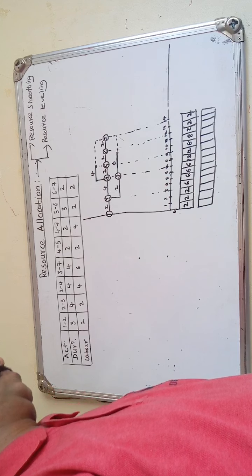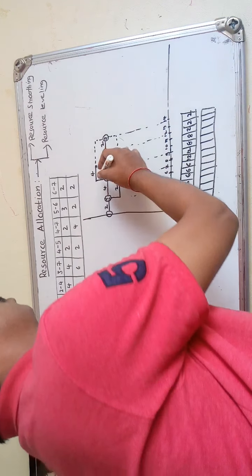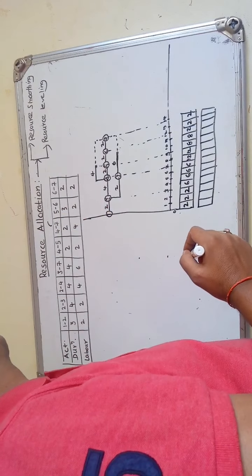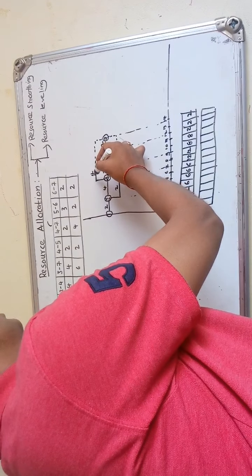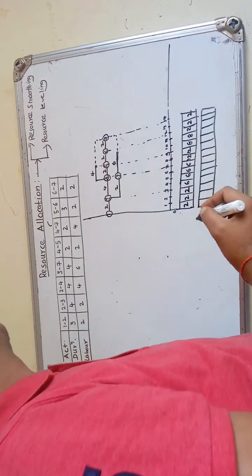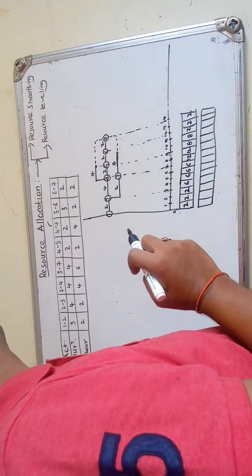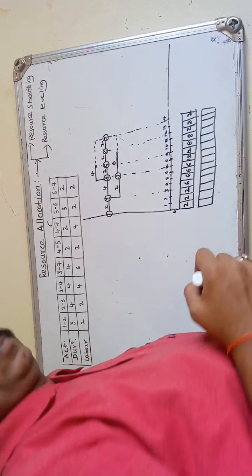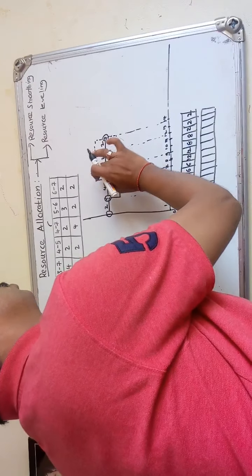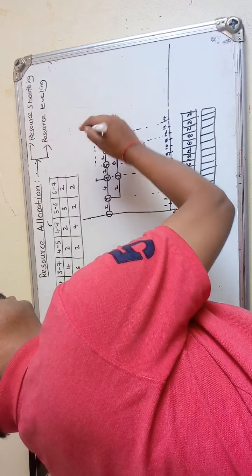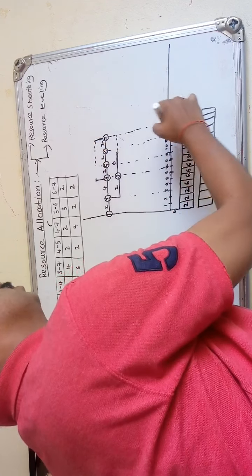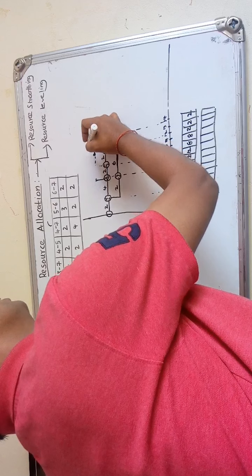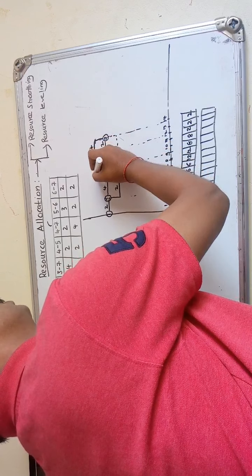Now if you see the 4 to 7, it requires only 2 days. If we shift the activity 4 to 7, it will require only 2 days, so the demand of this particular 8th and 9th day will get shifted. So let us do that. Shift this activity 4 to 7. Let us start on the 12th day, as it requires 2 days. 12 plus 2, that is 14. And the demand will be shifted to the 13th and 14th day.